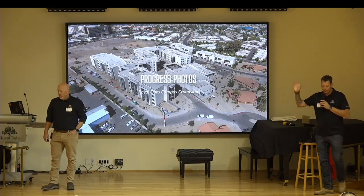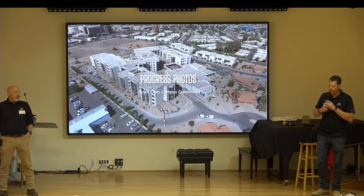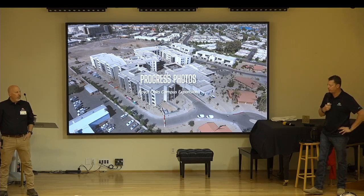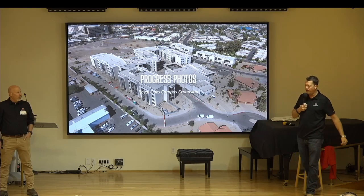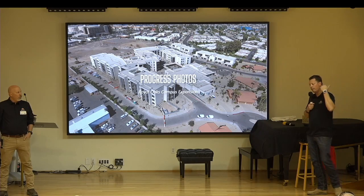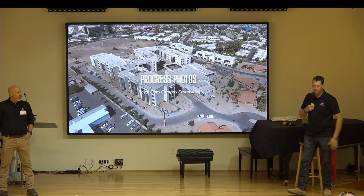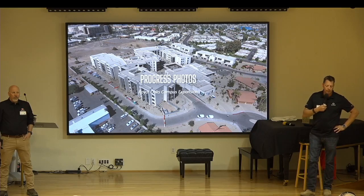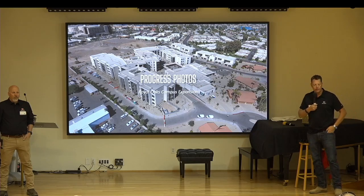So, obviously the garage was one of the first things that we focused on building, and there was something in the structure of the wall that we weren't totally a big fan of, so we asked the structural engineer what we wanted to do, and he asked us to put a relief cut in there. So we got their approval to wait as long as we could to get through construction, so it would go through a couple of temperature cycle changes along with all the loading on there. And so for anybody that was in and out of the garage yesterday, sorry for impeding your pathway, but it was an RFI that the engineer had us put a 1-inch relief cut vertically in